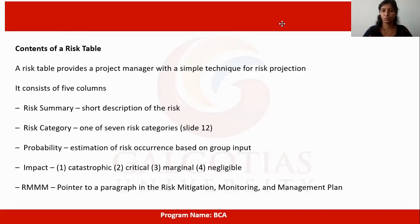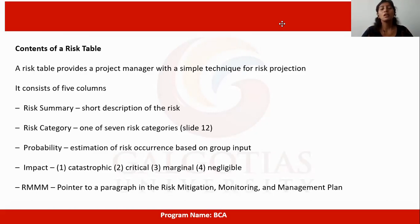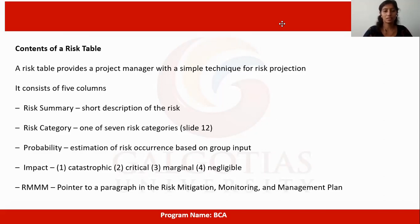A risk table provides a project manager with sample techniques for risk projection. It consists of five columns: risk summary — a short description of the risk; risk category — one of the seven risk categories; probability — estimation of risk occurrence based on group input; impact — rated as catastrophic, critical, marginal, or negligible; and a pointer to a paragraph in the risk mitigation, monitoring, and management plan.